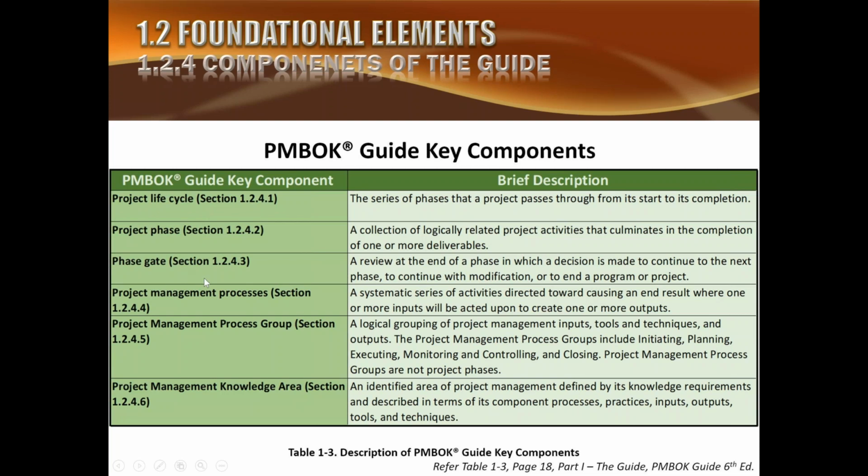Normally, when a project is to be terminated for any reason, we have to wait for the phase gate. We should not terminate the project right in the middle of a phase. This is a general courtesy that we should wait for the phase gate, let the phase which is in process complete, and once it comes out at the gate, at that point we try and terminate that project or program.